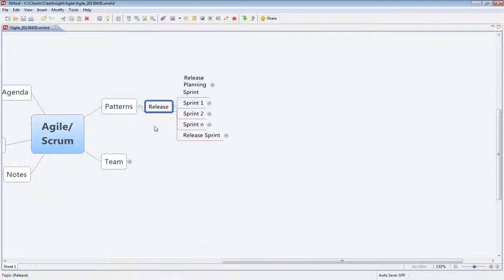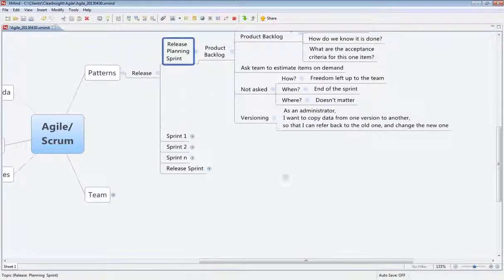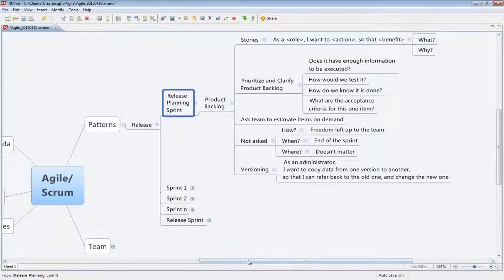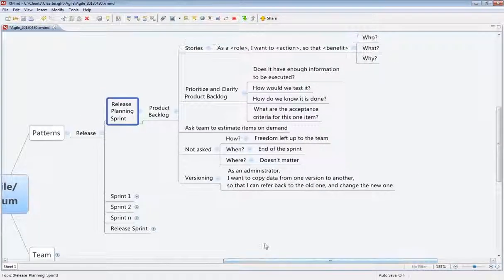And there's a project management of scope, schedule, cost, and quality. Whereas in Agile, there's still management of those things, but it's done differently. Here we talk about releases. And a release is really a period of time. You can think of it as almost synonymous with a milestone. But the difference between a release and a milestone is there's control over the release. The product owner gets to decide when they release something. Maybe it's ready early. Maybe it needs some more work, and the product owner is comfortable with the delay to get that higher quality.